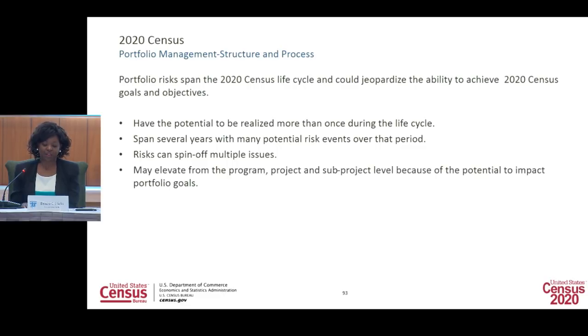Portfolio risks span the 2020 Census life cycle and could jeopardize the ability to achieve our goals and objectives. In addition, these risks are broadly defined and represent threats to the success of the portfolio rather than just to an individual program or project. In addition, portfolio risks have the potential to be realized more than once during the census life cycle, spanning several years, thus these risks remain open in the 2020 Census register until the last possible instance that it could occur.